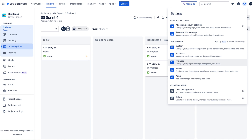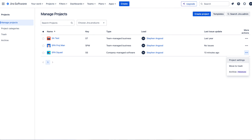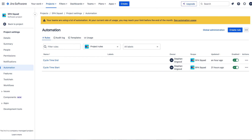It's now time to get our custom fields populated, and to do this we're going to use Jira automation. If you have Jira admin rights to your project, click on the settings cog, then Projects, click the three dots next to the project you're interested in, and click Project Settings. Then on the left hand side click on Automation. Here you're going to create two rules. The first will add the date your story first enters the In Progress status to your custom field CT Start — we want the first time because a story can go up and down our workflow, but we want to capture the very first time it entered In Progress to get the real cycle time. The second rule will add the date your story last enters the Done status to CT End, as well as calculating the actual cycle time and populating that to the Cycle Time custom field — last time for the same reason, as a story can go up and down even after entering Done.